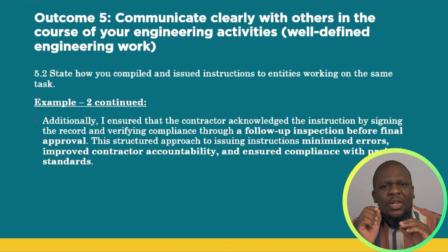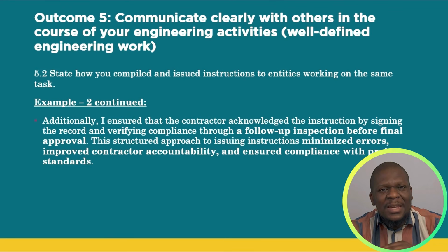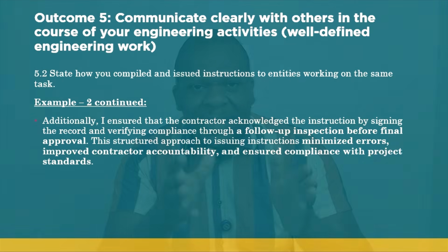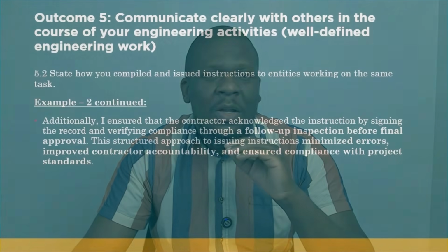Additionally, I ensured that the contractor acknowledges the instruction by signing the record and verifying compliance through a follow-up instruction for the final approval. Basically, you are explaining how you ensured that the instruction you issued was actually executed. It's very important that you do that to ensure that all instructions issued are actually complied with.